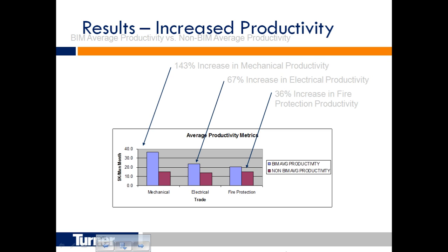Basically they bring in, run their mains, their branches, their arm overs, put in the heads to elevation, and they're only coming back to do trim. That's the part where you really start to see some amazing productivity increases.